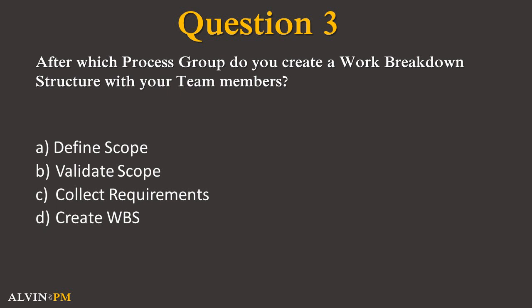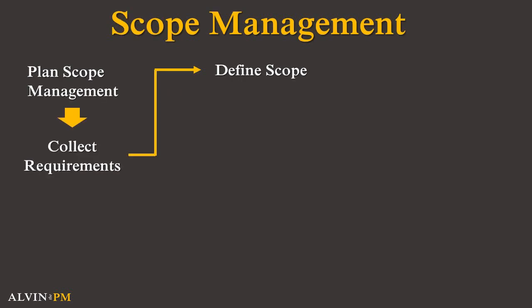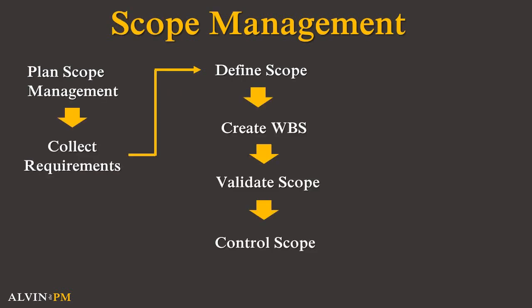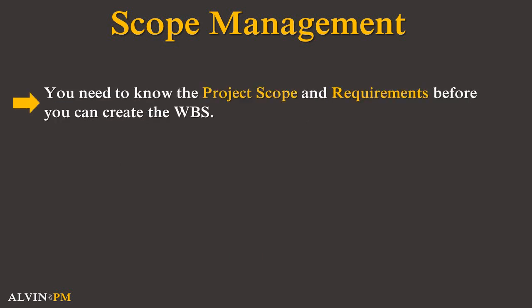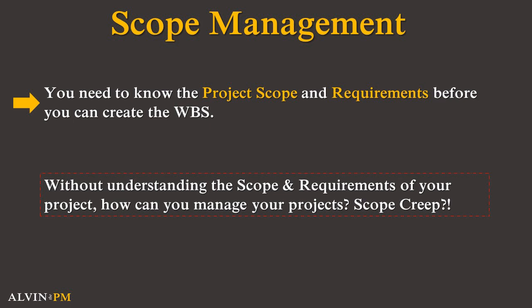This question requires you to understand the correct flow of the different process groups for scope management. If you selected A, then you are correct. Only after you and your team have defined the scope of your project can you work with your team to create a WBS. You need to have a clear understanding of your project's scope and requirements before you can begin identifying and breaking down your project's work. If you don't know what your scope is or your requirements are, how can you effectively manage and plan out your project without preventing scope creep?